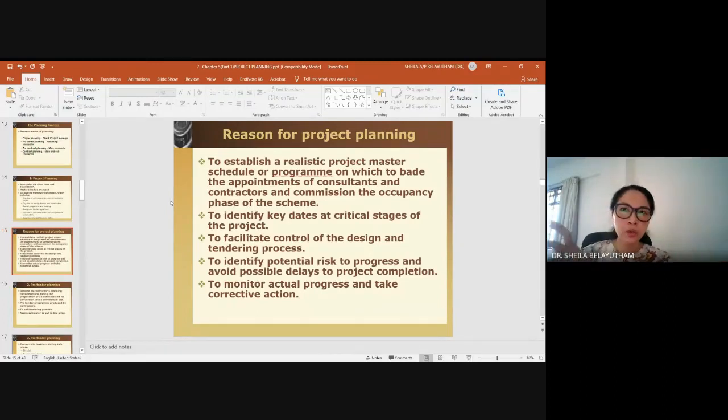So that we can use the plan to ensure that whatever progress is on site goes back to the planning. It is not planning one-off, and then you just leave it there and conduct another planning on site and do something else. It is not like that. Whatever planning, it should be well justified, representing the realistic, and that should be passed on to the contractor to implement their project in a more detailed manner. Hence any deviation on site could be identified from your plan. It is not just a plan for one-time sake that you then forget about. It should be brought throughout your project until the end.